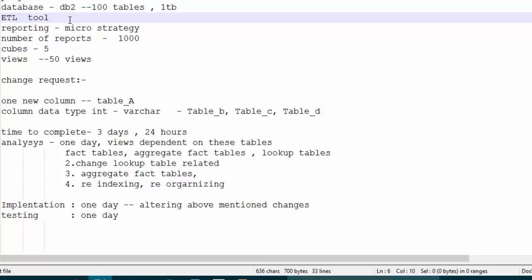Yeah, correct. And while giving estimates, we will not give 24 hours like this. Suppose from your end, as a BA developer, you need 24 hours. Even the ETL guy needs another 16 or 18 hours. Put together we'll give, because it's a collective effort, right? Correct. The timeline we mention, because 3 resources putting 8 hours every day will give a different one. But you should think as a whole, everything. Wherever data flows, it is your responsibility.